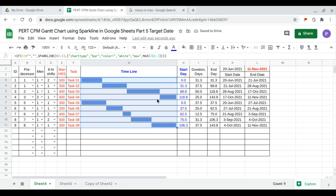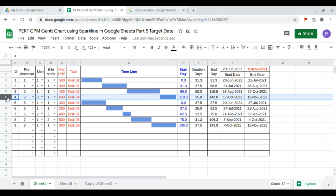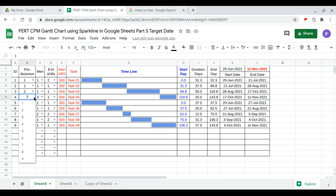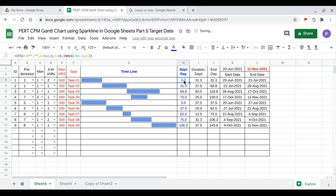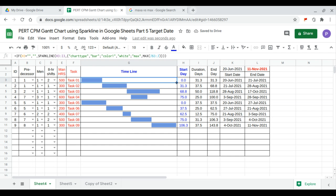Suppose I want task 4 to follow task 7 instead. I change task 4's predecessor to task 7 and update the cells.